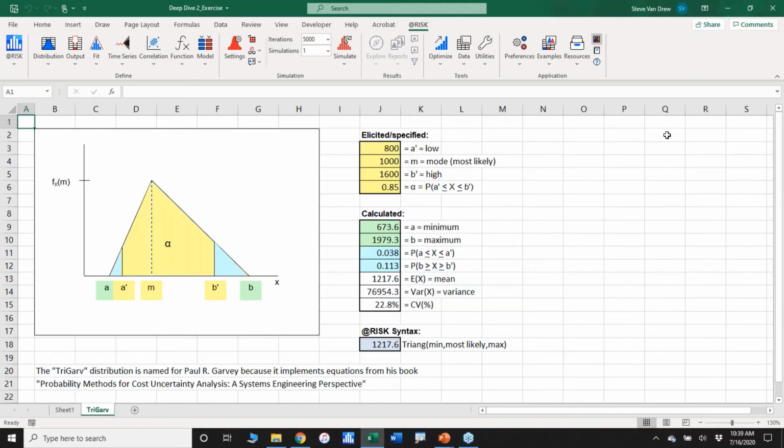That's not quite what it means. But what the uncertainty handbook that the Air Force put together doesn't do for you, mathematically, is it just says in words, find new endpoints so that you maintain the skew of the original distribution.